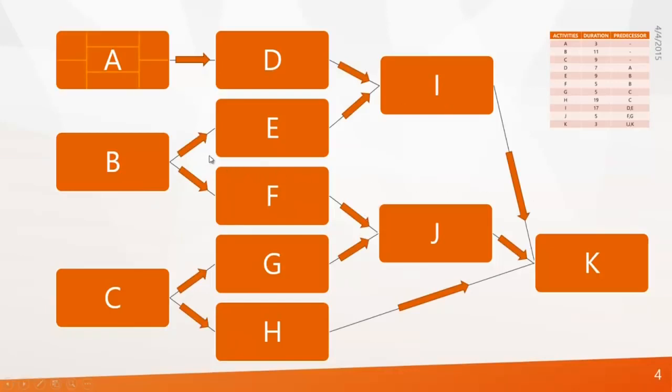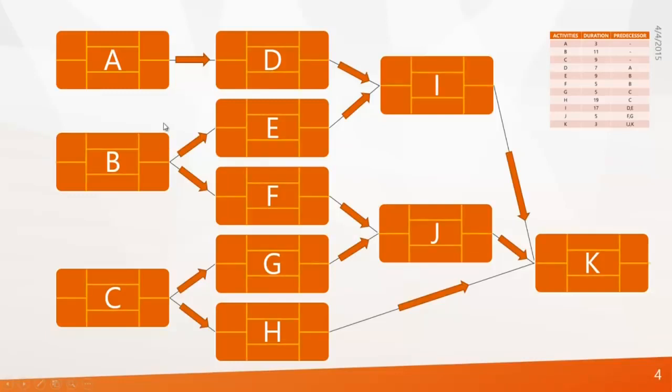The same techniques are adopted to sequence activities in construction. I recommend from my experience that all activities need to be arranged based on logic. Alright, now let's come back to the exercise. The next step is to give the duration to the activities. In a real-time scenario, experienced planners and civil engineers decide the duration of every single activity, and those activities can count up to 10,000 to 20,000 and more. Here, the duration of activity A is 3, B is 11 and C is 9, and so on.